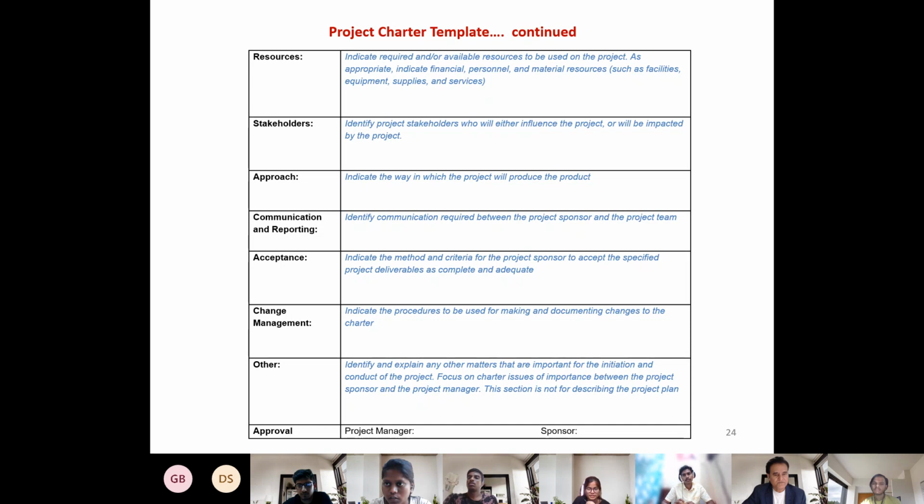So the delivery approach which we will be using, for example, sequence, like what will be starting and ending, the time period, and sorry, specifications of the project. Absolutely right. Specification of the project is the acceptance criteria. So you will write over there that we will give you at the beginning, in the planning stage, the specifications of the project, and in the final report we will demonstrate that the specifications are met, and only on that basis we will request you to accept the project and release us as the project is completed by paying all our dues and things like that.